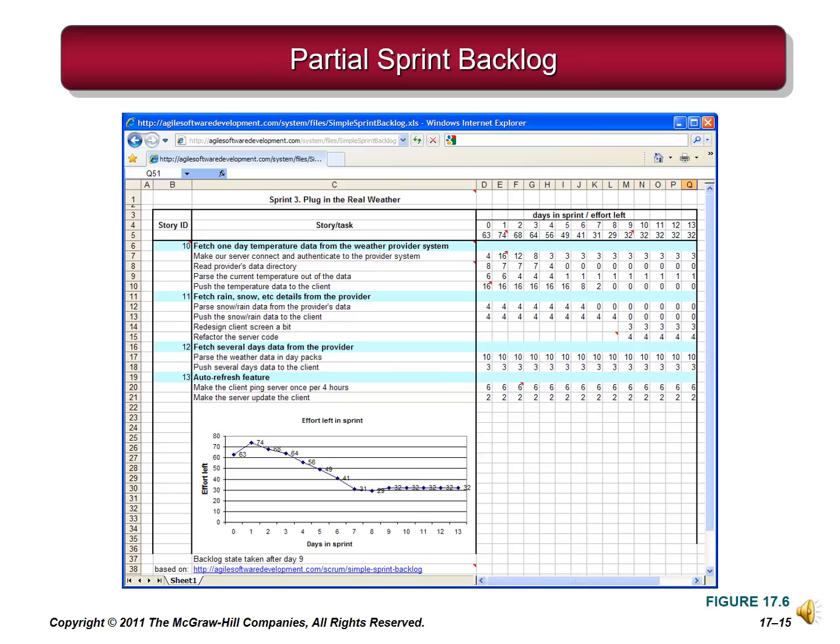As I stated earlier, each product has a product backlog and a sprint backlog. In this case, a sprint backlog is developed and controlled by the team. It represents the amount of work the team commits to complete during the next sprint. The sprint backlog lists the tasks or activities that must be completed to deliver the functional feature or that segment of feature.